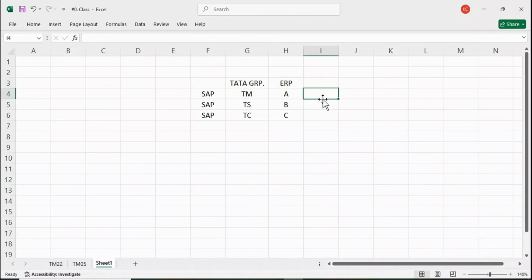So that is called implementation. Here, in this Tata Motor project, the installation and configurations will be called implementation. But from Tata Steel onwards, the same installation and configurations will be done later in Tata Steel, Tata Chemical, and other subsidiaries. So that is called a rollout project.